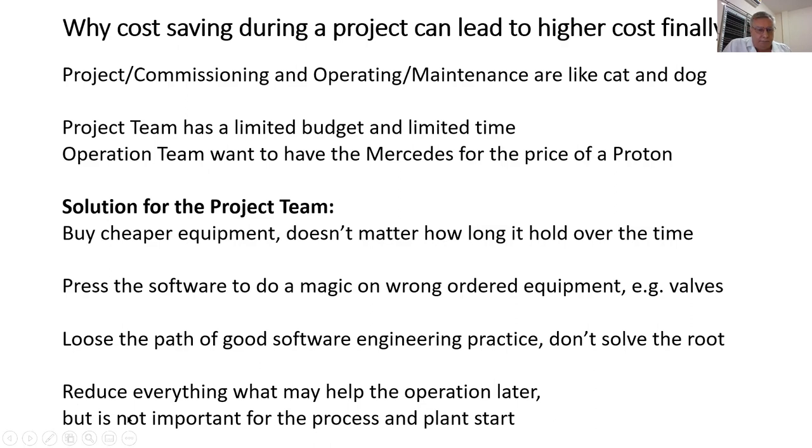And this is also something I have seen as well, that people told the operation they don't need it now. They can buy it themselves later. So we can take it out from our project part. Just let it reduce the cost, everything is fine for the project team, then the project team disappears from the plant and lets the operating and maintenance still with all the things that they have done wrong.